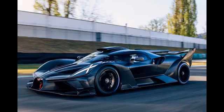The procurement process. Larry Jeffers Race Cars, procurement process in action, agile versus traditional. Project: development of a new, lightweight and aerodynamic car body for the upcoming racing season, target completion date August 15. Scenario 1, agile procurement, custom carbon fiber body. Initiating: LJRC identifies the need for a lightweight and aerodynamic car body to improve overall race lap times by 1 second. They estimate a weight reduction of 15% compared to their current car body, which weighs 2,200 pounds, is achievable. This translates to a target weight of 1,870 pounds for the new car body.